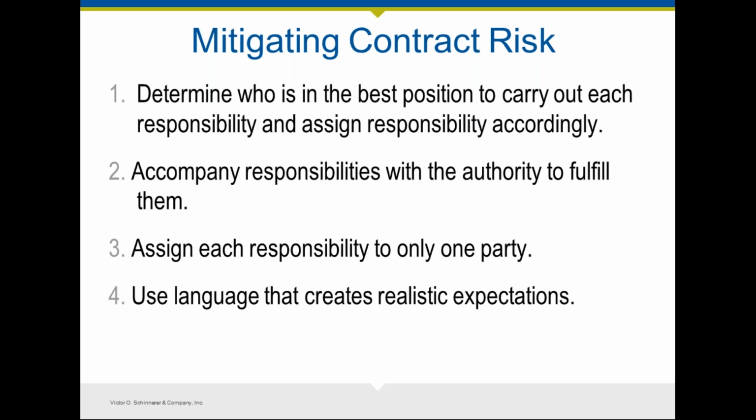This is also a way for you, the design firm, to manage your project, because anytime there's a change in additional services, which is not unusual in a design contract because there are additional conditions that show up, you want to make sure that that is an opportunity for you to collect additional fees. The last thing that you want to have is an agreement that you have taken pains to negotiate, and you come to find out that things have progressed beyond what is stated in the agreement, and there's no actual written, executed agreement in place that reflects the reality between the two entities.